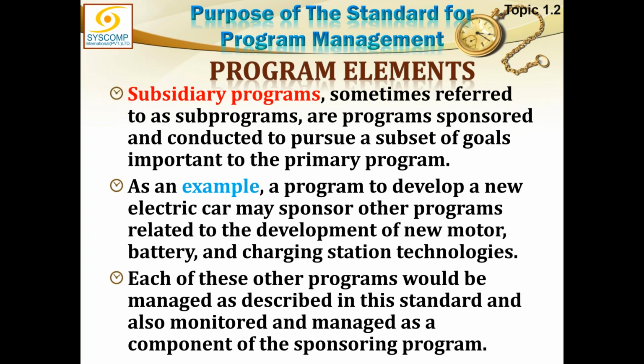So they will behave like small little programs, and they will be feeding the main program. As an example, a program to develop a new electric car may sponsor other programs related to the development of new motor, battery, and charging station technologies. So they could be sub-programs of the main program. Each of these other programs would be managed as described in this standard and also monitored and managed as a component of the sponsoring program. So the bigger program, the main program, is the sponsoring program, and the sub-programs are contributing towards that.